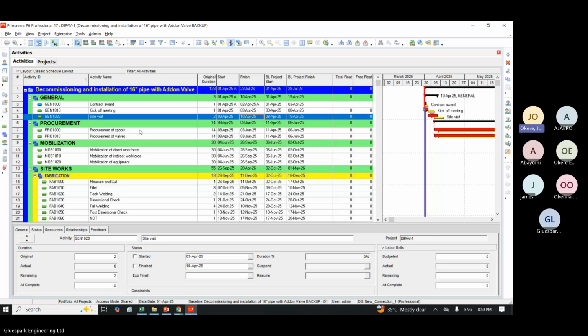This project is being championed by the WHO, and Saipan now collaborates with the WHO. Inside the WHO and Saipan, they have thousands of subcontractors supporting them. Each of these subcontractors has a small scope, but they will all bring it together. The WHO and Saipan will integrate their schedules inside one schedule to deliver that one project called Train 7. So somebody will sit down and integrate all the schedules you are bringing, and we call it an integrated schedule.